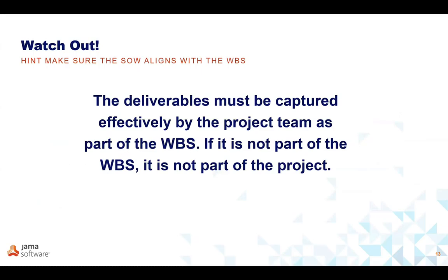So watch out, or warning. The deliverables must be captured effectively by the project team as part of the WBS. If it's not part of the WBS, and you need to pay attention to this if you're contractors, then it's not part of the project, right?